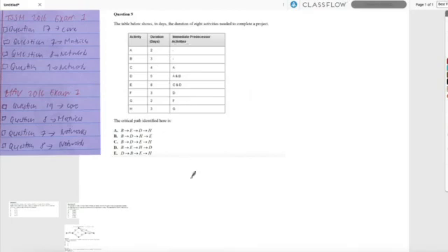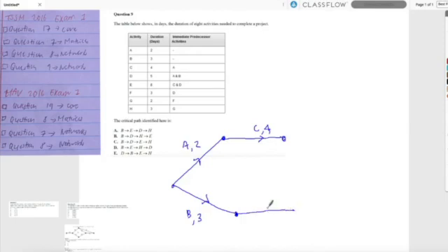A and B have no immediate predecessors. Let's kick it off. A, 2. B, 3. Now, C has an immediate predecessor, and that is A. C is of 4 days duration. Let's keep it going. D has immediate predecessors of A and B, and it goes for 5. So I'm seeing a dummy here. That's a dummy. I can put in A0 or D0 or whatever, or nothing.